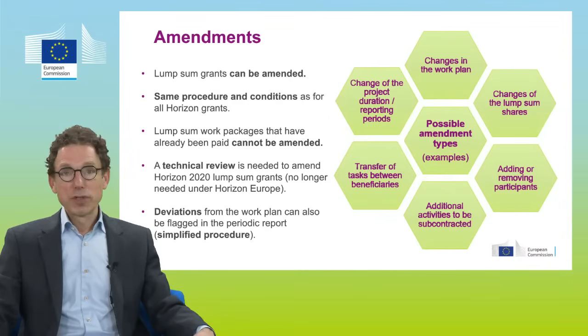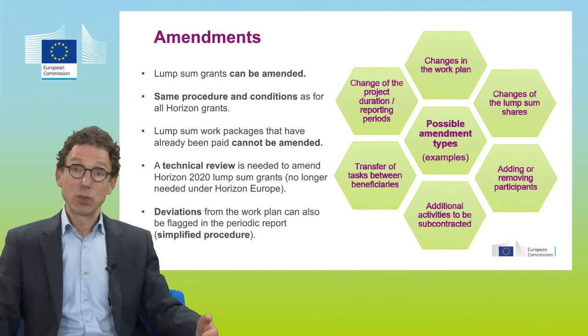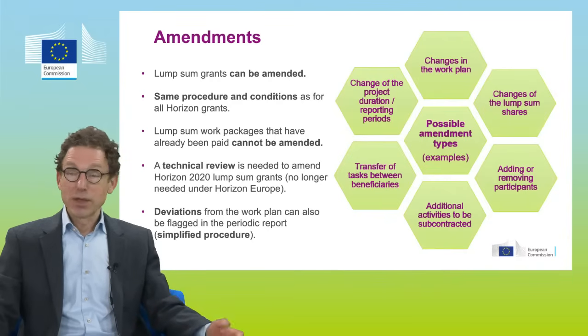The only other principle I'd like to highlight for Horizon Europe is that once a work package has been completed, accepted and paid, we consider that to be a closed part of the project and you cannot amend it anymore. Because in this lump sum scheme, we have, if you like, cut the project into parts. We have defined the price for each of these work packages, and once it's completed and paid, we are not reopening it again. So that is the only thing to consider.